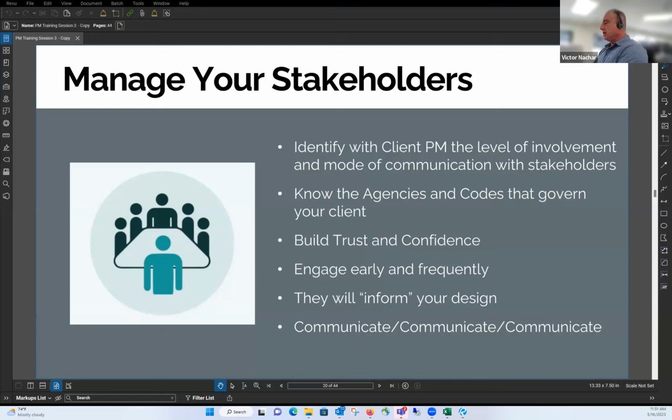But early on, when we launch the kickoff meeting, we instruct and we put it in writing, and it's documented in a PowerPoint presentation that gets documented officially to indicate the start of the project. In there is also where you catch up on things that were missed in the contract, such as, hey, look, we'll respond back to you in a 2 to 4 week time frame.